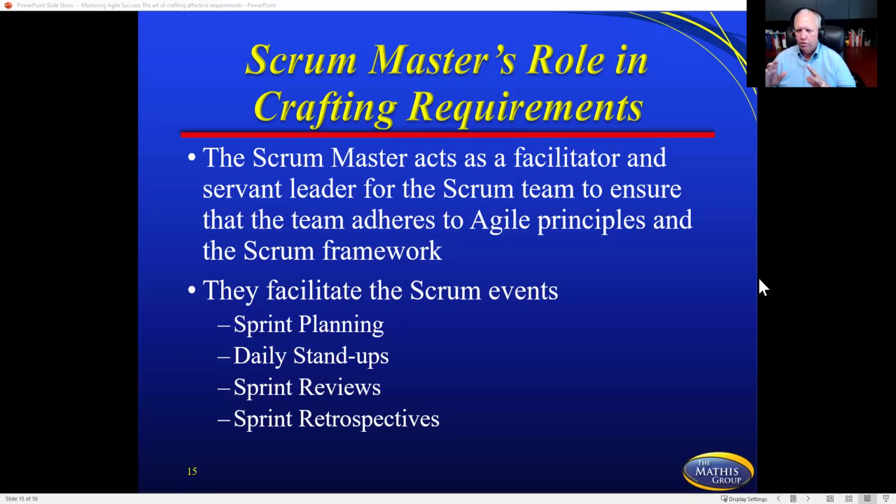depending on who you research and read, are really kind of an interchangeable word. Sprint review and sprint demo would happen at the end of a sprint to demonstrate to the customer what it is. Now, maybe you call them something different, but they'll be called sprint review and sprint demo. And then sprint retrospective. That's like a lessons learned. Lessons learned takes place, or that's retrospective takes place, at the end of each sprint and at the end of the project. And the purpose for it in Scrum and Agile is so that we can learn from that sprint and use that knowledge in the very next sprint.